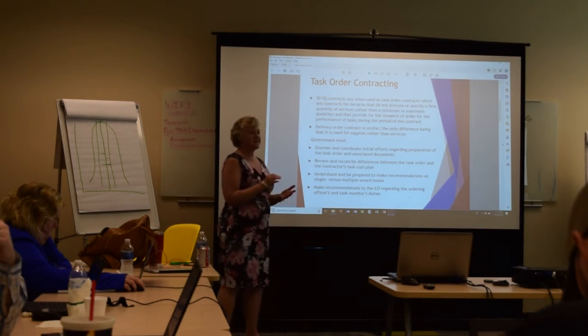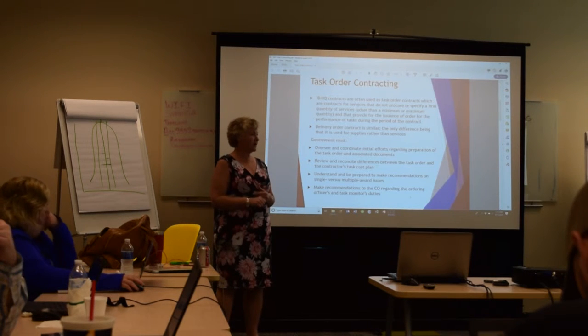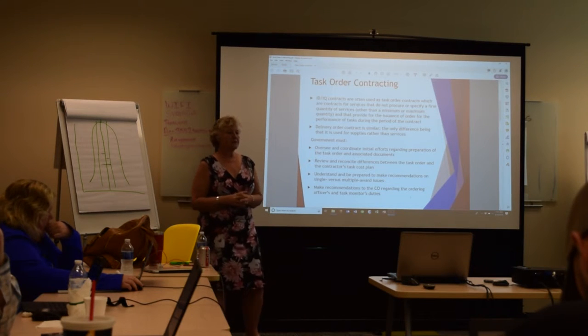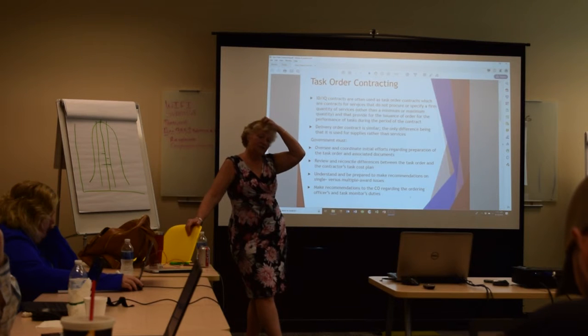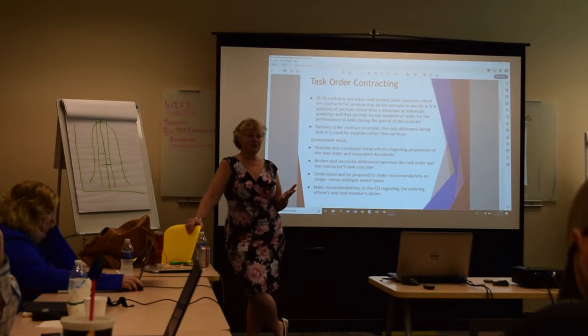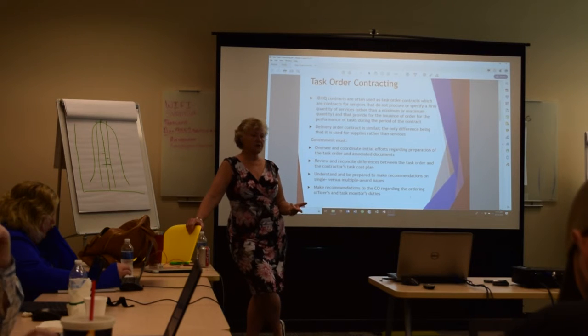Anything that's an indefinite delivery, indefinite quantity contract, IDIQ, means that the government at the time of the solicitation did not have a good handle on what their requirements were. So in your case, every once in a while you're going to need to put new products forward, and you're going to need some engineering to do that. But on January 1st, you don't know how many hours of engineering you're going to need, or how many products you're going to release this year.